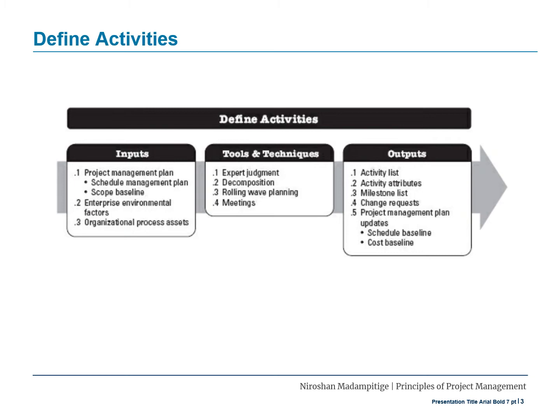The organizational process assets that can influence the Define Activities process include but are not limited to the lessons learned repository containing historical information regarding the activity lists used by previous similar projects, templates that contain a standard activity list or portion of an activity list from a previous project, and standard processes and existing formal and informal planning-related policies, procedures, and guidelines, such as scheduling methodology, that are considered in developing the activity definitions.